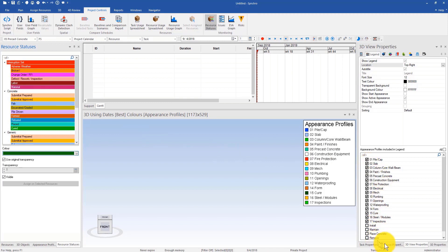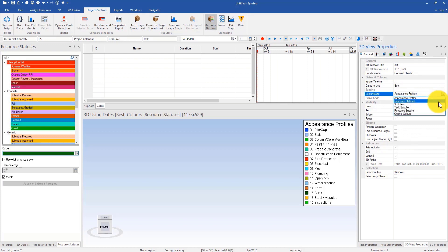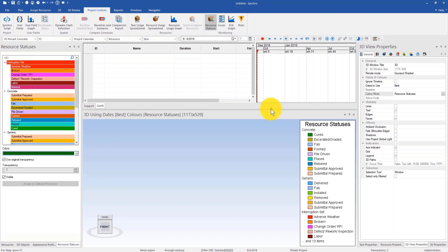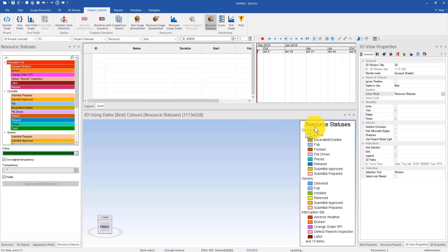To show those in the 3D view properties again, you need to change the color mode to resource status. Then the resource status color will replace where the legends were and it'll show up in the 3D view. Resource status is only mostly needed when you're using Synchro site or Synchro X for statusing or field verification for resources. Those are good to have as a company standard as well or a department standard.